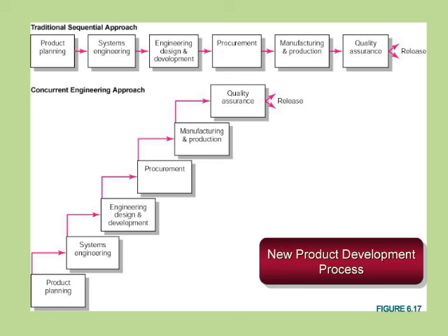But at the same time, look at the relative distance, if you will, between getting a product out under the conventional sequential approach versus a concurrent approach. You can see a significant savings in time, assuming that it's worth the risk and the potential of having to do some additional work.